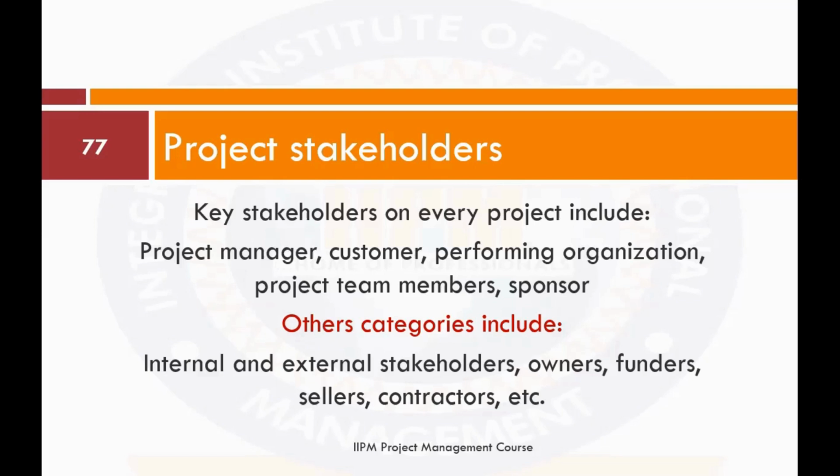Now, in the project environment, looking at stakeholders as a case study, we were supposed to use a machine to break that. And I saw youth who said, okay, let's give them work. Since they are saying they need a job, we gave them work. For about 3 days, those guys, I think there were about 11 of them, couldn't break that slab. They couldn't move it any inch. So we looked at our time and said, if we continue this way, we won't be able to finish this project on schedule. So we asked them how much we could pay them so that we would just get a machine and break it and continue, since they can't break it.